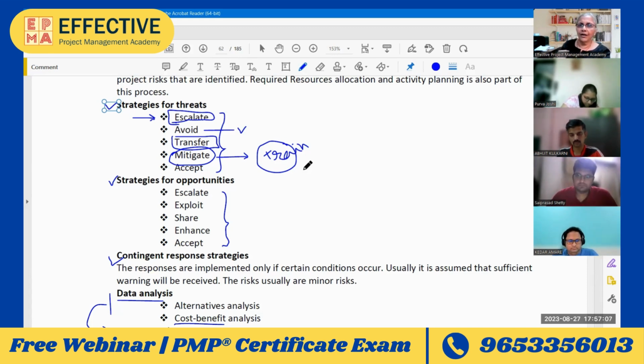If you give it a thought, avoiding is a special case of mitigation where you make probability and impact both zero.